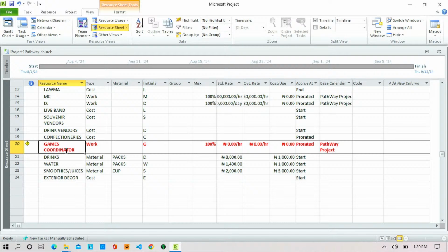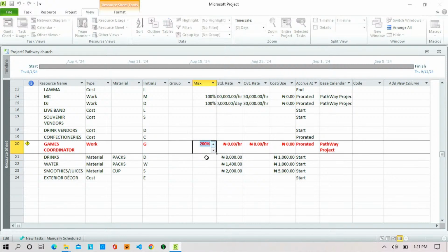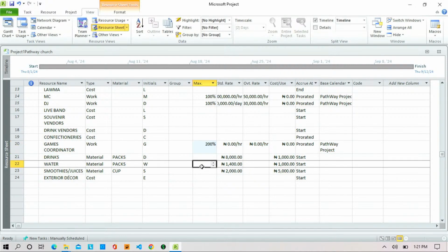Thank you. I think we can engage more hands. That scenario comes into play, provided cost is not an issue. So let's increase the number of coordinators that we have. $150 to me is still red. 200 is no longer red. So it means that we need two coordinators for this particular event. Is that okay?